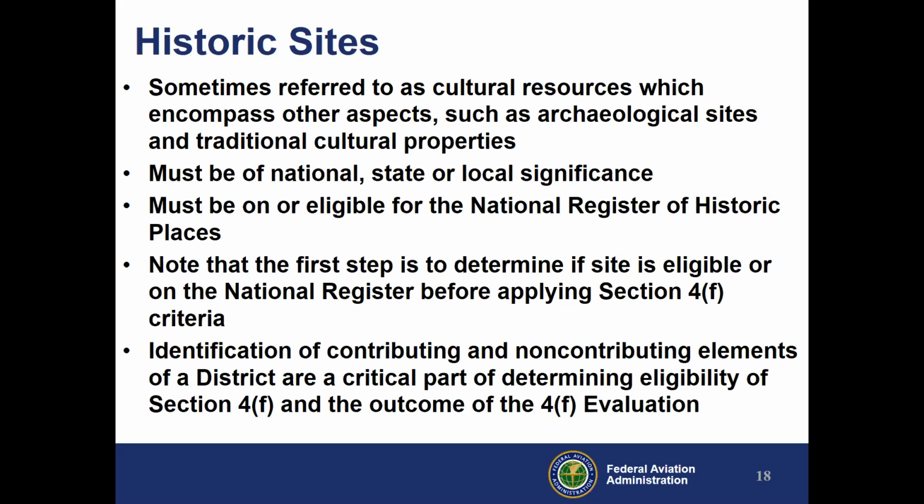For example, we had a historic district on one of our recent projects. Everyone seemed to be just focusing on the one hangar, but there was actually, if you looked up, other older hangars similar in type. And so getting an architectural survey done of the remaining buildings on that property, we ended up having a historic district. The beacon tower was a contributing element of that historic district. And all of that was described in that 4F evaluation.